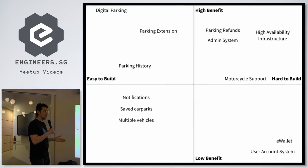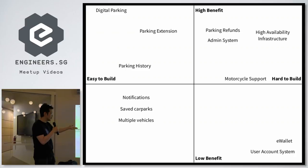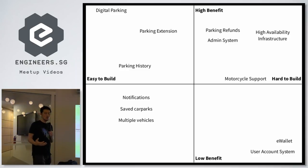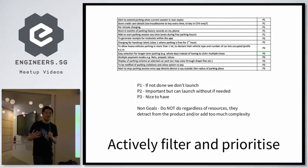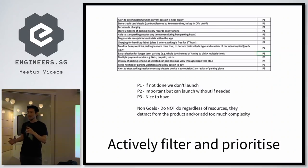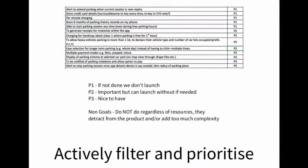There's a bunch of stuff you obviously do, but there's a lot of stuff with low benefit — not no benefit, not bad, but some benefit — that is quite complicated to build. Things like an e-wallet or a user login system: both provide some benefit but are rabbit holes where you can sink a lot of dev time. In the government and in big companies, a normal tech project has a 'gathering requirements' phase where the project manager goes to all the stakeholders and gets everything everyone ever wanted into a giant list — for us it was like 178 features. If you were doing this the traditional way, you'd just build all of it, and unsurprisingly you end up with an incoherent bloated app that does a lot of things very poorly.